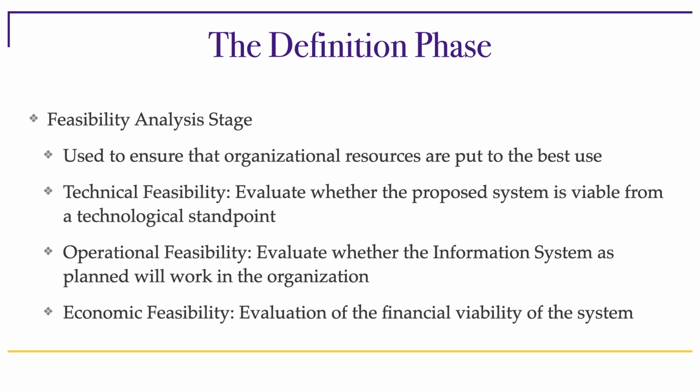It's also a very important phase because you haven't spent a lot of resources at this stage building anything. You're basically envisioning and then analyzing the feasibility of a possible future project. So the investment is very limited compared to the total investment, and this is the right time to make a decision whether to go forward or not.